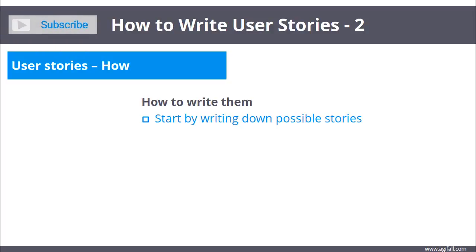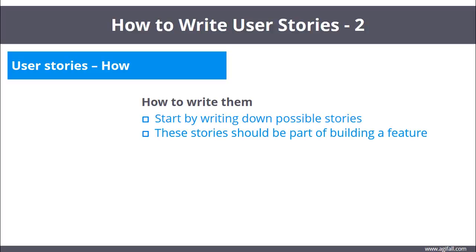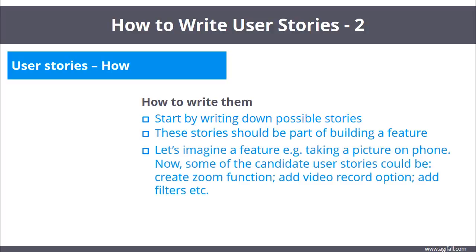Let's see how to write user stories. Start by writing down possible stories, otherwise known as candidate stories. We write these stories because we believe they will be part of building a particular feature. Let's imagine a feature, for example, taking a picture on the phone. Some of the candidate user stories could be: create a zoom function, add a video record option, add filters, etc.